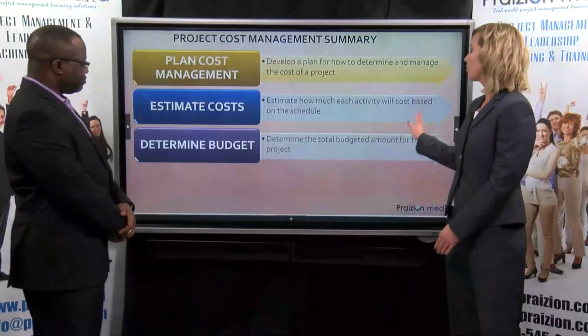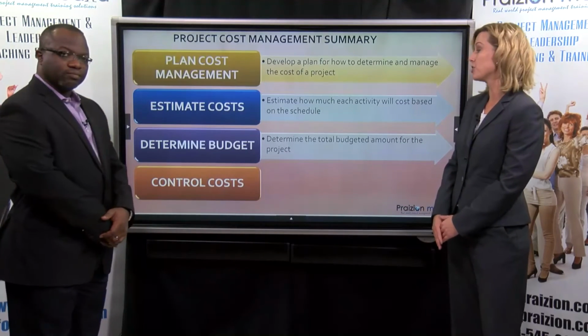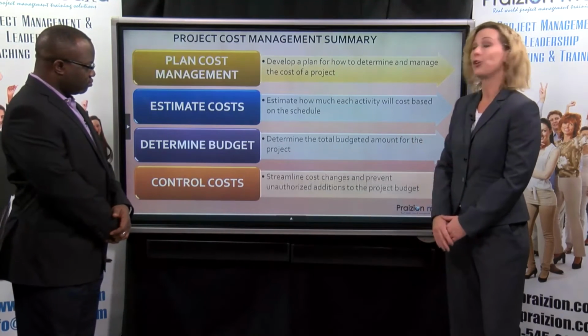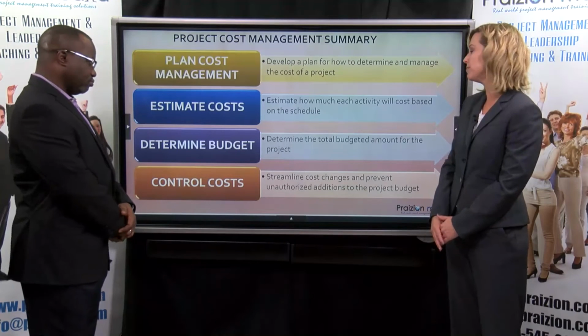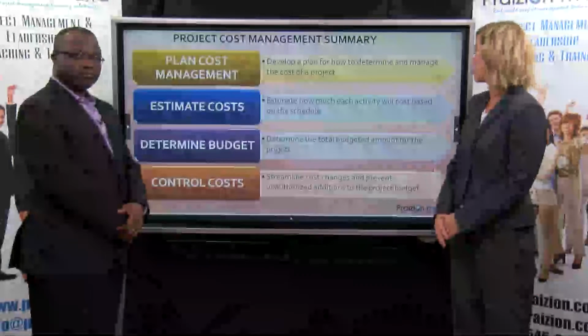Well, we need to control our costs, so we've hopped over into the monitoring and controlling knowledge area here, and this is where our earned value techniques come in, and we're taking a look at what our baseline cost is, our cost baseline, and what our actual costs are to make sure that we can still meet the mark that we agreed to with our project.